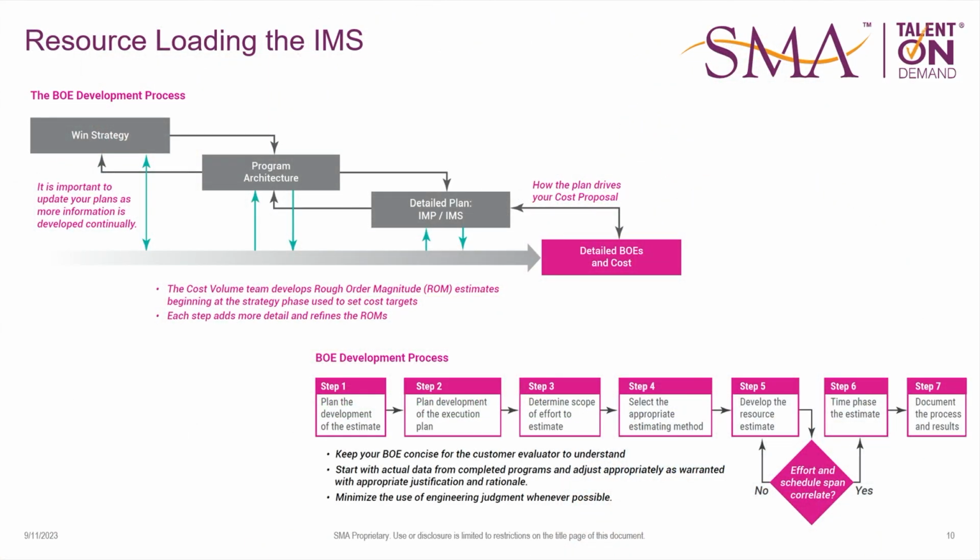Okay, now I know resource loading is a bit of a loaded question because a lot of proposals don't require you to submit one, but it's almost like you have to have one in order to do your costing properly, right? That's right. And honestly, I actually believe it's easier to do your costing if you've done a resource loaded schedule because it's forced you to think through how are we going to get all the work done, and it also helps you balance and load your resource plan. You're not peanut butter spreading across things.